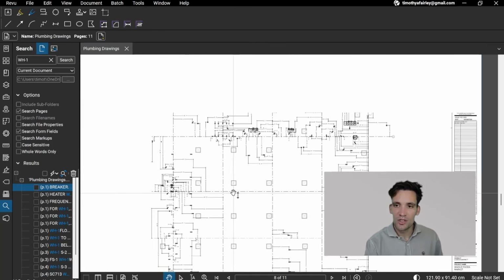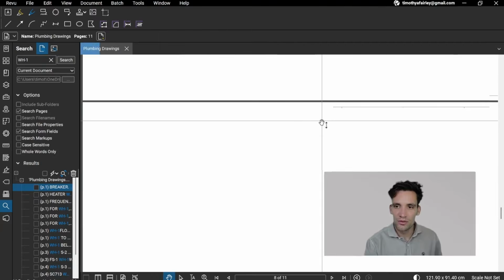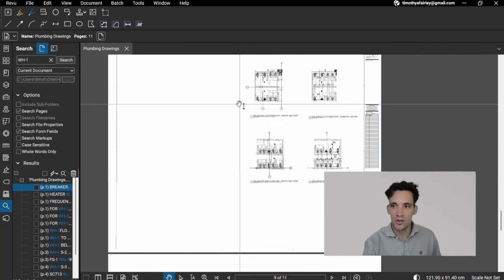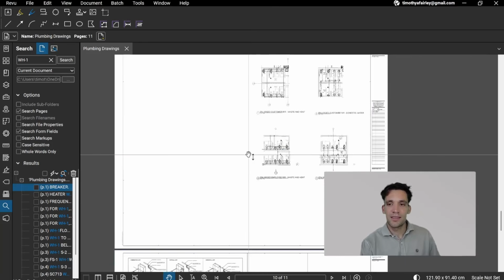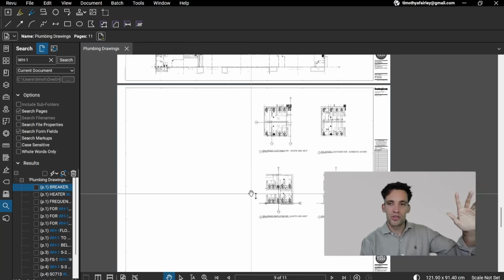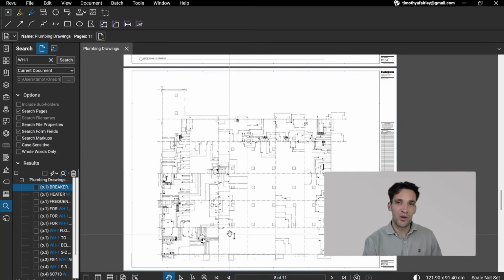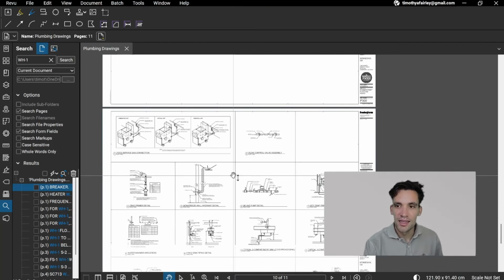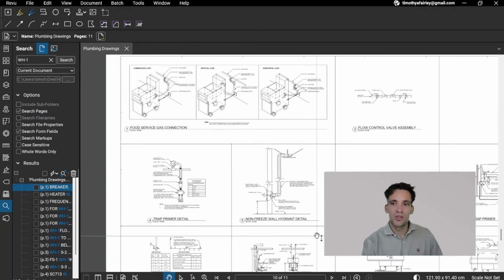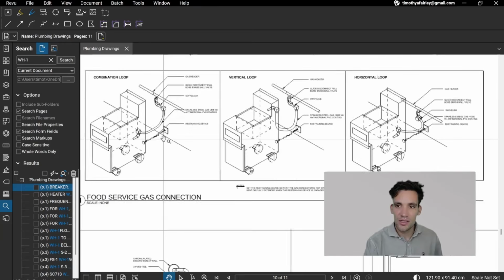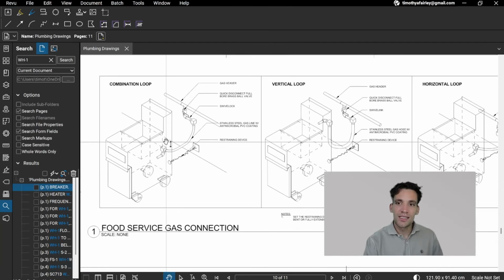a dimension plan which shows the set off to all of the different points. So you could use this to get more accurate measurements. Okay, so those are our layout drawings. The final part of this is, we've got schedules and general notes. We've got our layout drawings where we can get our lineal meters of pipework, and then at the end, we have section views, which are detailed close-ups or maybe even isometrics, like you can see here, of the exact connection arrangements.